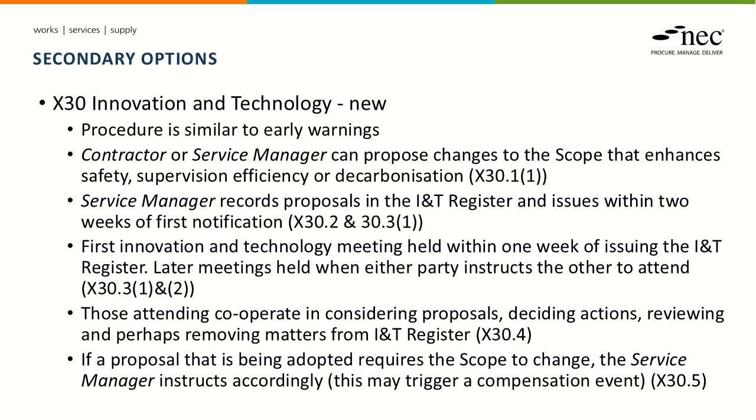It works in a similar way to the early warning process, insofar as either party proposes changes that would enhance safety, supervision efficiency, or decarbonisation. The parties meet to discuss those changes and discuss who's going to do what in terms of implementing them, or if indeed they want to implement them.